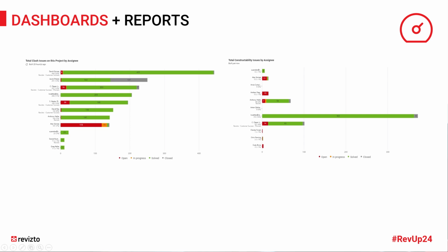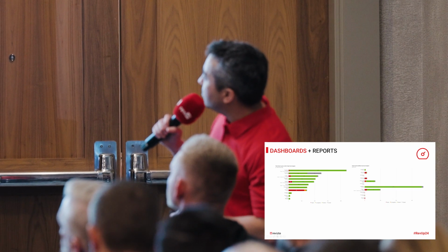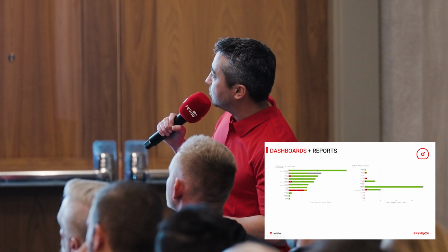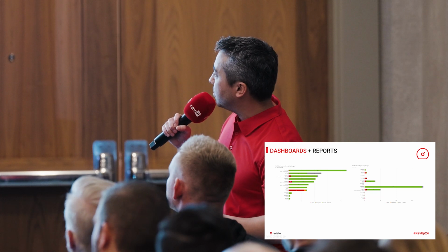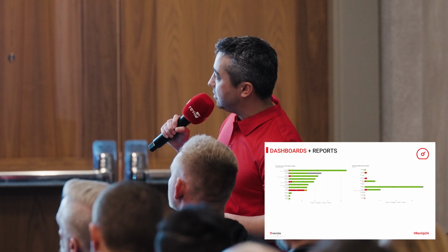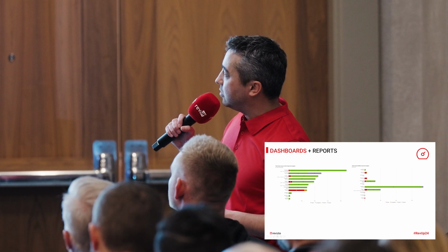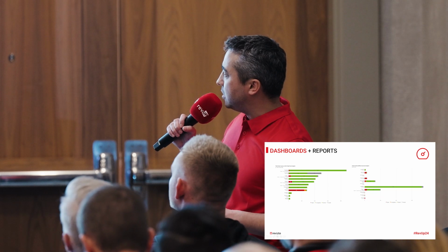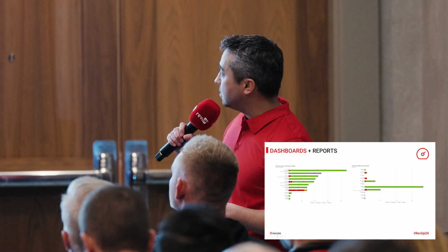Some more dashboards. You can get really clever with these dashboards, but here you can see it's looking at the issues by assignee. And I like to create ones for clashes. I like to separate clashes from constructability issues. This is really important because I really just want to focus on constructability and design. I let the subcontractors typically look at this at the beginning of a meeting, but they really need to close that out outside the meeting, so your meetings are really concise.